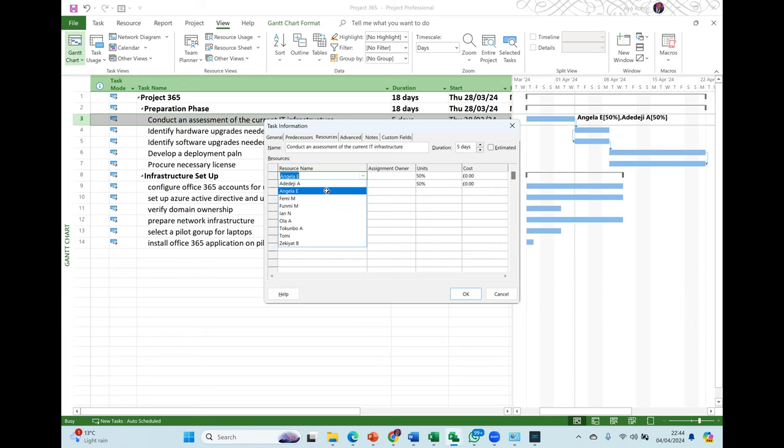And I said, you can change the unit of that particular task. If you know the unit, you can say, you know what, 50%. 50% of Angela and 50% of Adedeji is what I need. Okay? Got it. Make sense? Yeah, thank you.